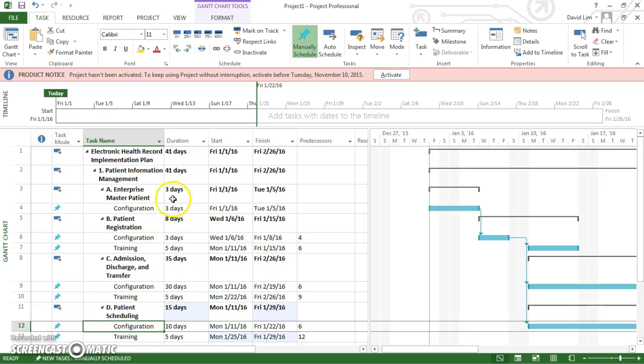So this is basically your schedule here so far for the first major task. You'll notice that the dates get automatically adjusted according to the number of days it takes and what day it is. Like on Friday, it jumps to Monday. You'll notice here it doesn't have Saturday or Sunday because nobody works on Saturday and Sunday, at least for this project, we're assuming that.